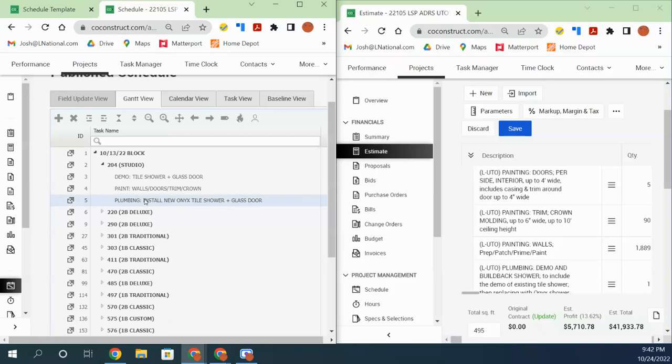That's why editing the schedule is something that is done on nearly a daily basis. If you are in project management, your schedule is something that you live and breathe every day. At the very, very least, on a weekly basis, you're doing your updates to get caught up on what's happened in the previous week's time.